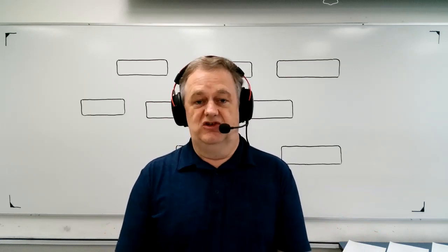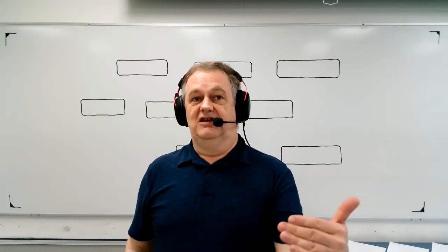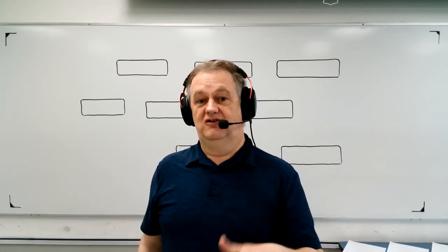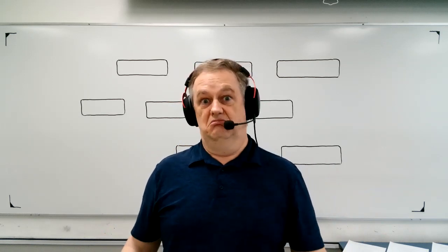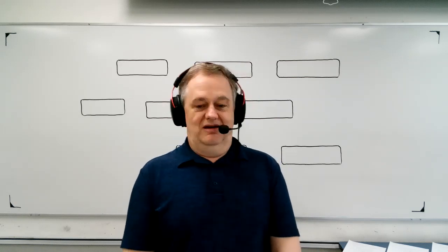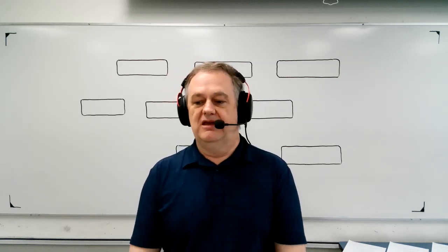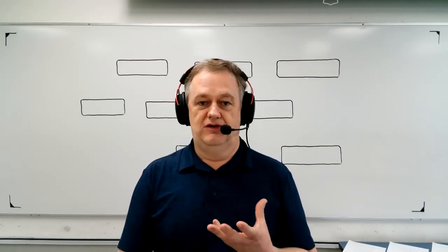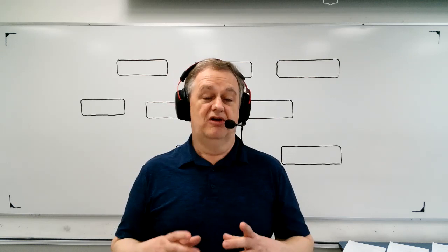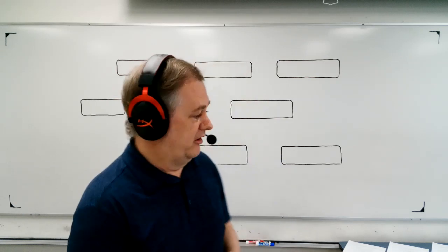And when there are deviations and changes, the important thing is that it gets sent to whoever has to make a decision, and then in a timely manner, that decision gets passed back to whoever actually has to move the wall, right? So our goal in the next few periods, as we go through the prints and drawings, is to understand and get an overview of this process, and particularly we want to understand the parts of it that are going to impact essentially the electrical work.